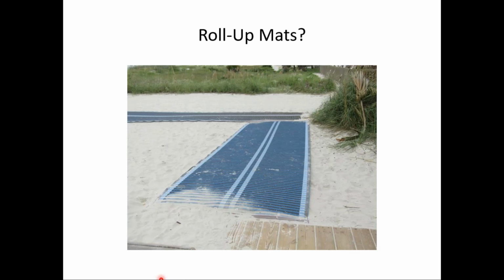So why not maybe put a mat like this over a stone surface, level it up a little bit, smooth it out, but then put this type of mat over it. You can make something firm and stable and be an accessible surface for a short period of time. And then with these, when you're done, you can roll these up and use these on other projects. So that may be a solution.